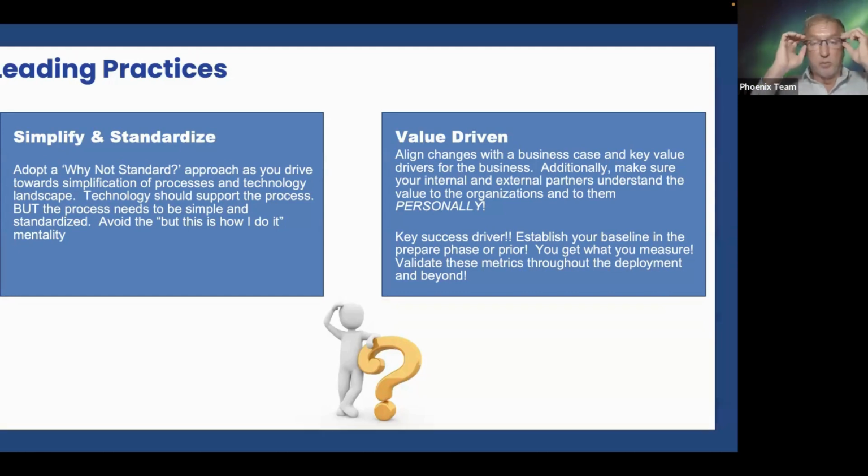But also, and let me give you a real good tip. No one does this. You need to baseline your information in the prepare phase or prior to that. What do I mean by that? You need to find out what you spend or how many sourcing events you run or how many contracts you process now before any technology is put in. Because what you should see once the technology is put in, you should see an increase in productivity on sourcing and contracts, and you should see less spend being violated through the procurement process. But you wouldn't know that unless you actually measured it first.